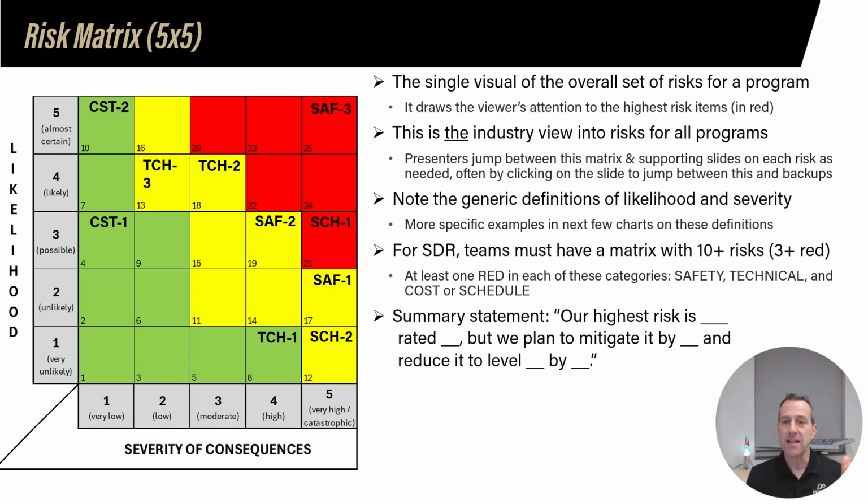And what I've done is I've taken the opportunity to put the unique ID on the matrix as represented on the risk register. Again, you'll notice that very quickly the audience can absorb exactly the risk posture of the overall program as you see how many fit in the reds, how many fit in the yellows, how many fit in the greens.